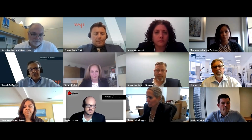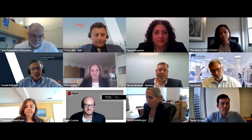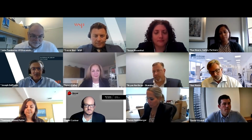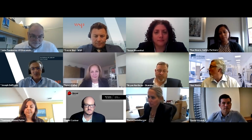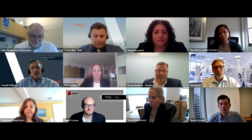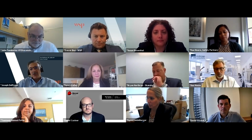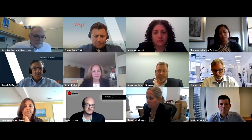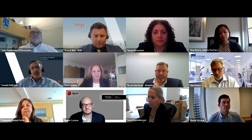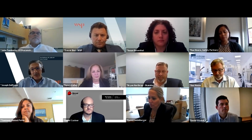Well, maybe I'll answer that one. I'll take a shot at it. It's definitely an opportunity. One of the things we find is that a lot of the design information might come a little later in design, and when a design builder wants to start building, we might not have all the information that's needed. So it needs to be an active discussion about all the needs of the project and programming of the project to make certain that the design keeps up with the construction, and the construction can be paced accordingly.